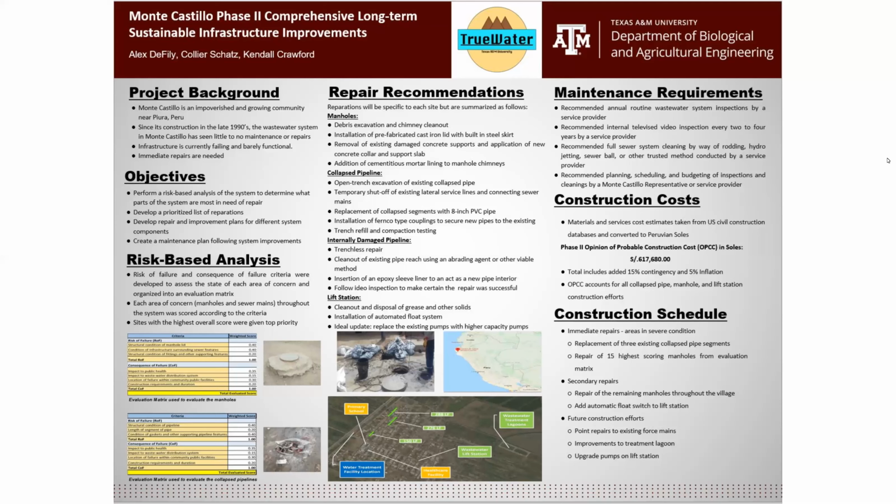Our construction cost portion of the project was pretty difficult to get through because we didn't have access to any Peruvian cost sheets or cost estimates or any type of Peruvian sources. So what we did is we took U.S. civil construction prices from different American databases, and we found items, tasks, and services that were either pretty similar or identical to the ones that we would be needing for our construction efforts, and we converted those prices to Peruvian sols.